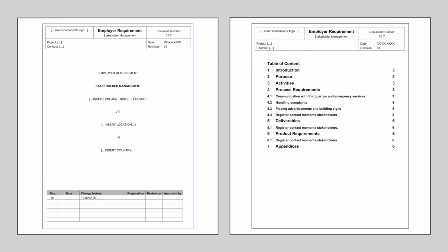The stakeholder management requirements are different for each project, especially in view of local authorities and other organizations. In this section, the key important thing is to specify which of the parties leads the communication with which stakeholder. This also includes media and emergency services.